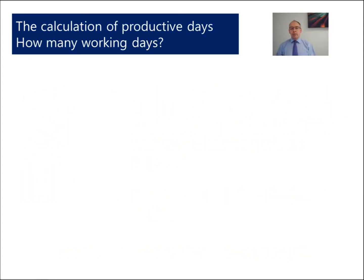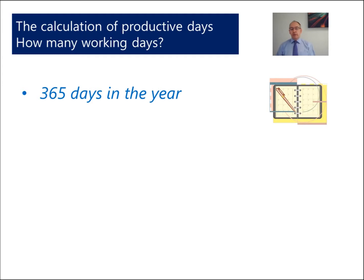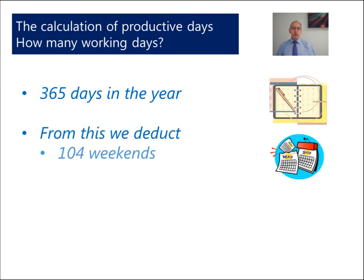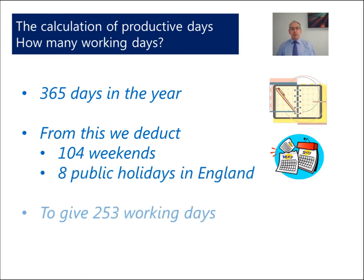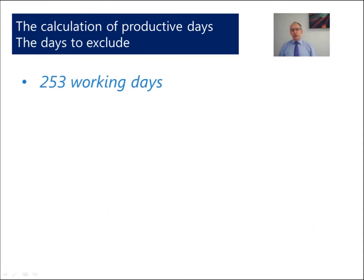First, let us work out the number of working days. Of the 365 days in the year, we need to deduct 104 days for weekends. And in England, there are 8 public holidays. This gives us a balance of 253 working days.